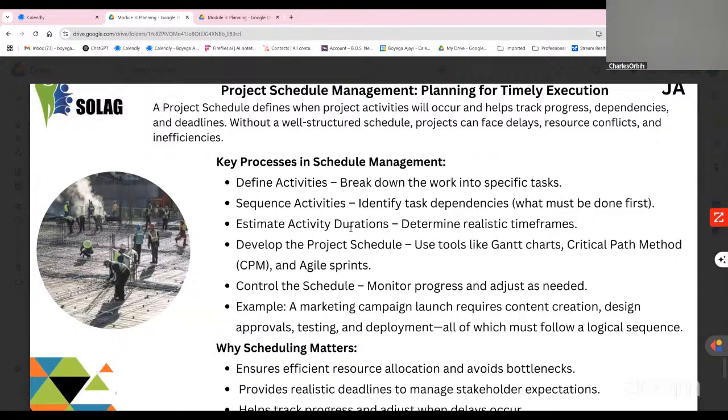Just a minor thing to add. I like what you just said. In terms of getting the hall, for example, you probably want to determine the number of guests you are going to have. I know that in our culture, everybody just shows up, but that is a key dependency. So if you're estimating, say, 200 people and you get a small hall, you want to take that into account, because if you get too small a hall, you'll be overcrowded. No, that's part of the requirement inputs. I think it is important, and in project management, that is key. Yeah, I think it's important.